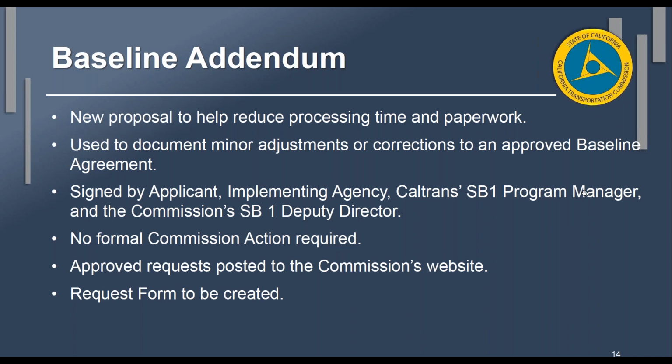Yeah, Kevin Busey. I had that issue occur where we had a two-phase project, two segments. They're both funded through LPP. One project came way under bid, and then on the next project, we actually increased the scope beyond what was in the baseline agreement to ensure that we captured all the SB1 dollars. We basically had to inform CTC staff in advance of doing that, and then process an amendment through CTC prior to award. That's how we did that.